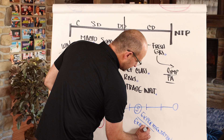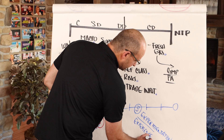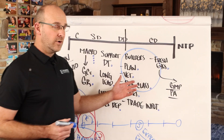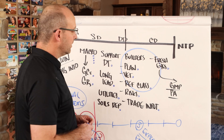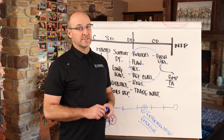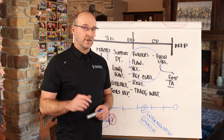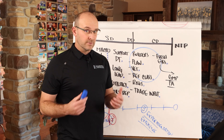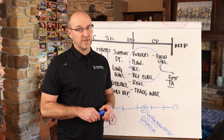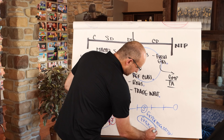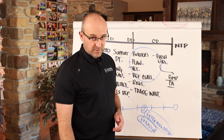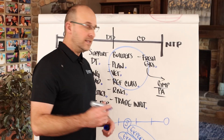Principle three is experimentation. Experience with these types of projects is key, but it must be paired with experimentation. Why not literally build the entire logistics plan out of styrofoam in the office? Why not build the building and its zones out of styrofoam, look at different crane locations, bring in people to review and double-check you? Statistically and historically, project teams that experiment with the project beforehand perform the best.